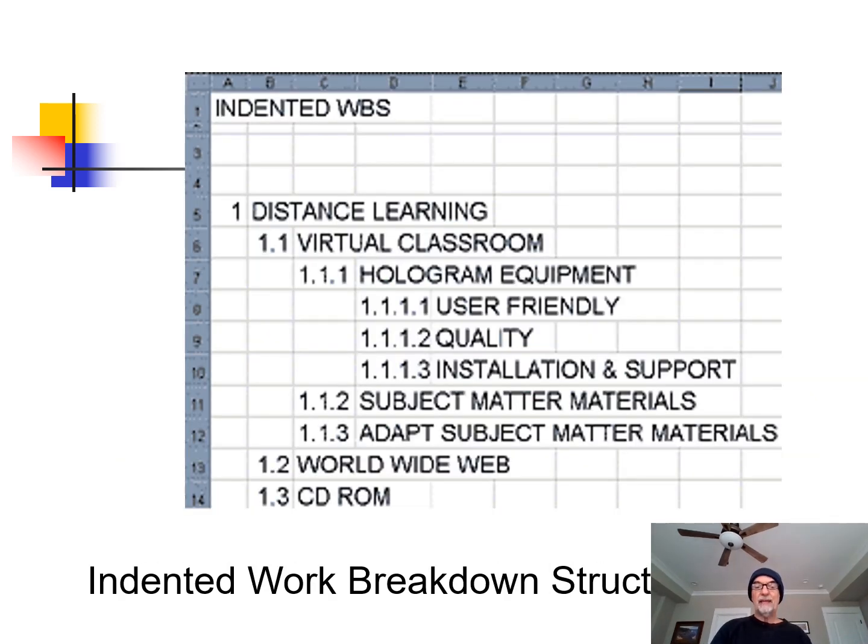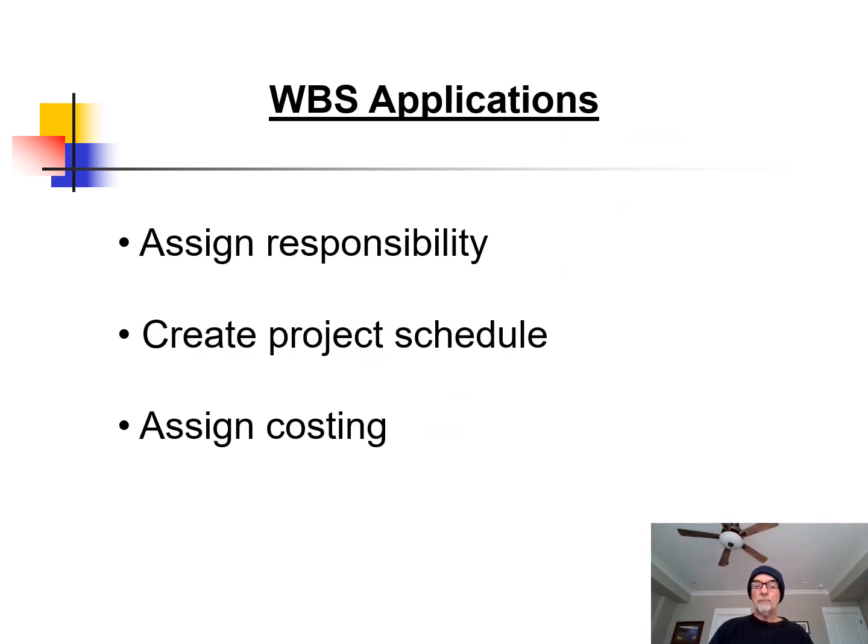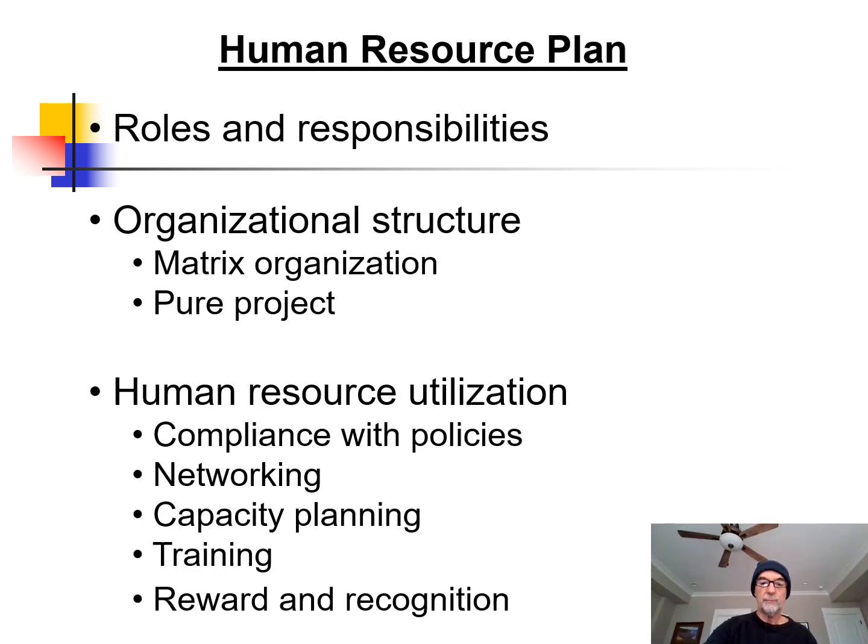Now, you can also have an indented work breakdown structure, and this one is very good for large projects because if you want to just go with the diagram with boxes, that's going to be pretty out of control. But this is something that you can easily do going down using Excel or something similar. Now, the work breakdown structure is great for assigning responsibility, creating the schedule, and assigning costing.